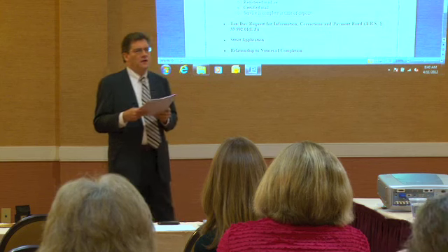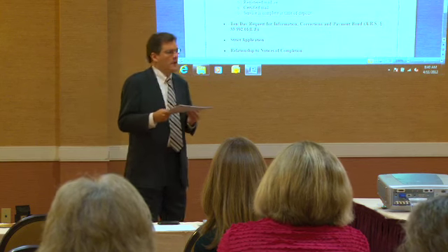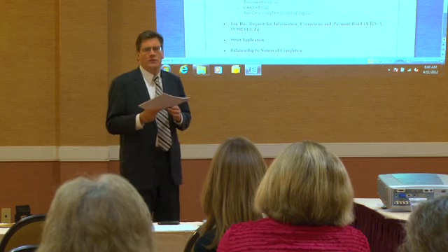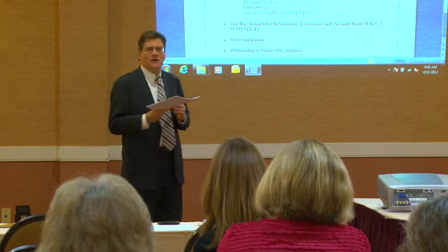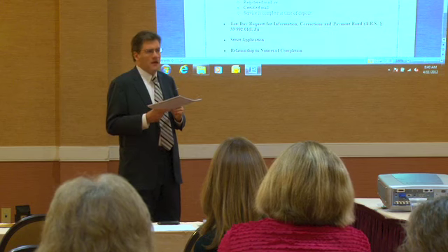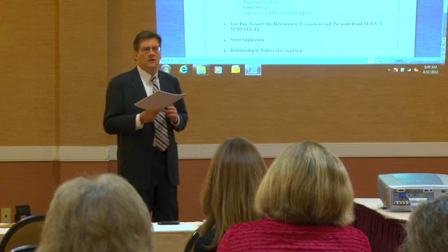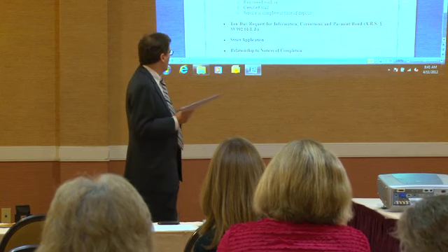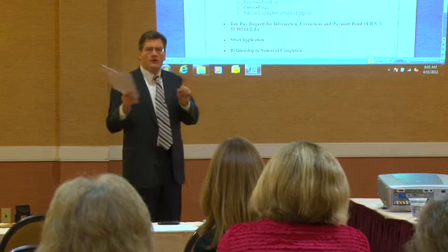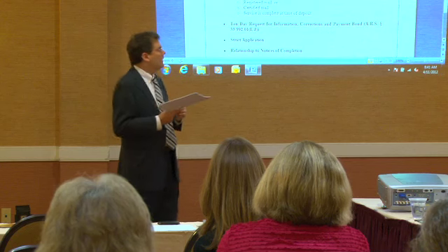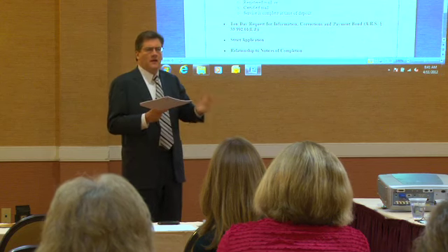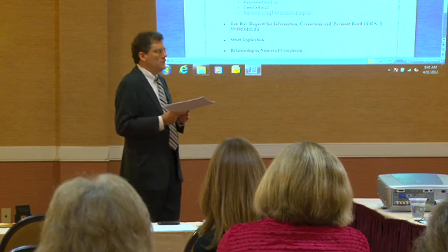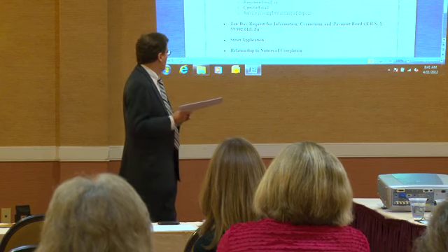We look at the assessor's website and we put in the address. It's a very simple process, and they will take you directly to the deed of trust. And from the deed of trust, you can generally determine whether there's a lender and what the proper names of the parties are, all right? But as long as you made a good faith effort and, out in the public domain, the information you have on your preliminary notice matches what's there, then you conducted yourself in good faith.